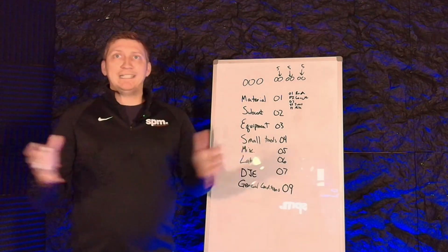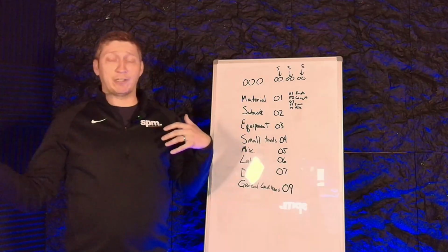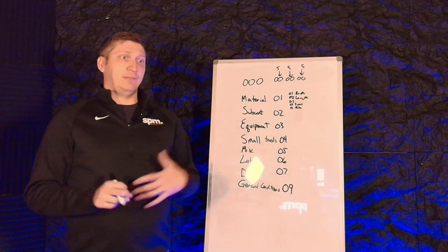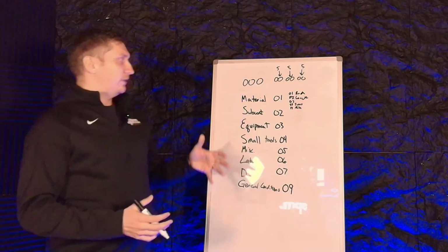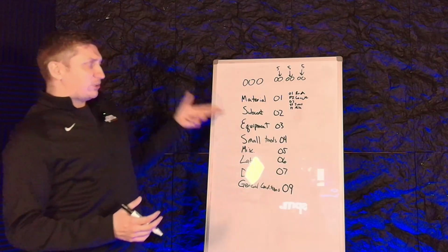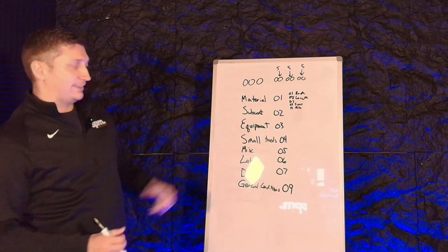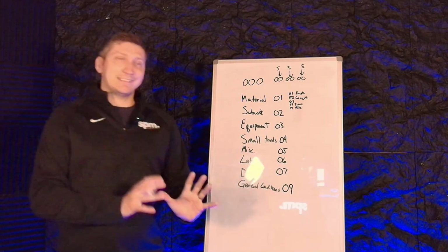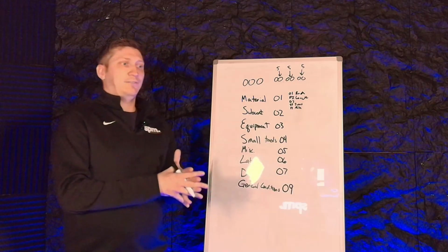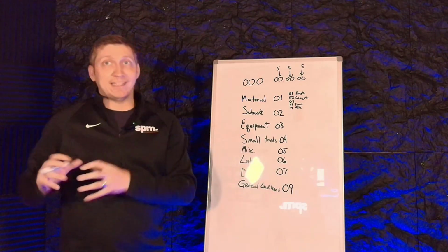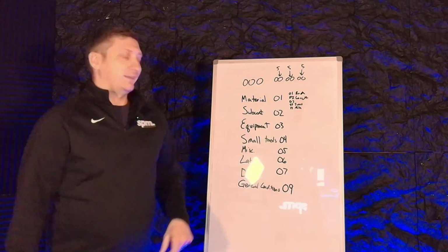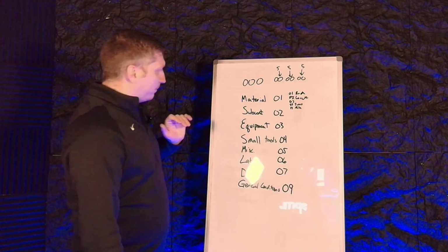What might that be? Trash pumps. If I have to go buy one of those or rent one of those, or maybe a UTV or something that's small that it's not equipment to do the job. It's not a rental vehicle. Oh, and I'd also have like a 05 for trucks. Trucks are a different bucket for superintendents or people like that versus equipment to actually do the work. That's how I break up equipment.